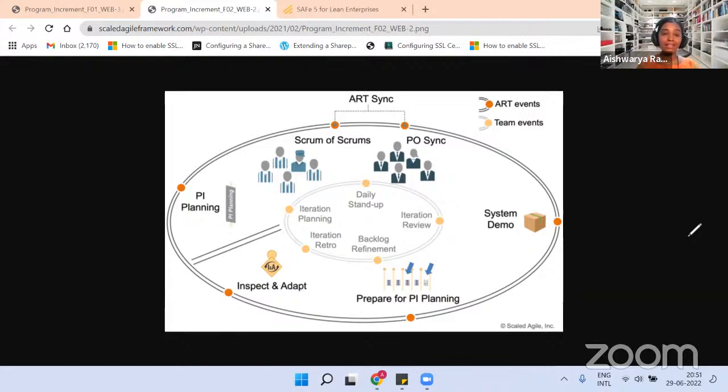There is nothing wrong in it. So quantitative analysis is all about seeing the numbers, metrics, doing the analysis and coming up with the improvements, right? Qualitative analysis is all about asking questions like what went well, what did not go well, what can be improved, what can be maintained, or you can make iteration retrospectives very creative also. It does not have to be like this.